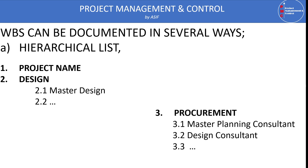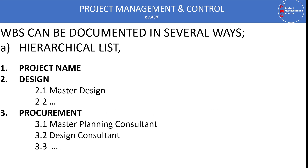Procurement may cover the procurement of the master planning consultant, procurement for the design consultant, procurement for the supervision consultant, design engineer, and procurement for different contractors for the project. So our total project is the name, then our mega deliverable is design, then procurement, then construction. Under construction, if we have different buildings, those become mega deliverables; if only one building, then different components of that particular building.